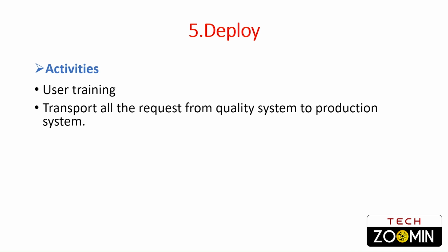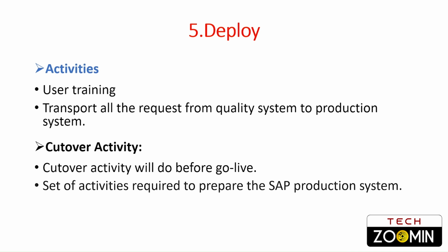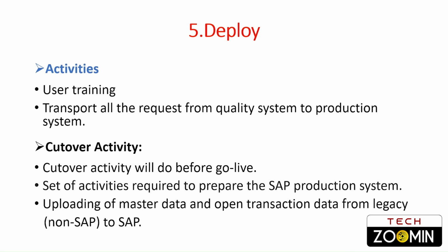Okay, so next the cutover activity will start. This cutover activity will be done before go live. Cutover activity includes the activities required to prepare the SAP production system, like uploading of master data and open transaction data from the legacy system to the SAP system. That means non-SAP to SAP.